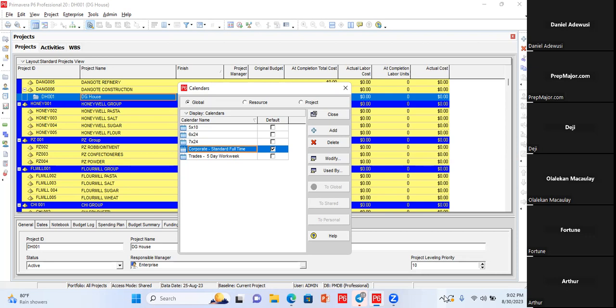So I'm just using mathematics now, sorry. So Omolola has joined me to work on the task and she has 4 days. So for those 4 days, we're able to finish 1 task each. So that's 4 days accounted for that we are done.